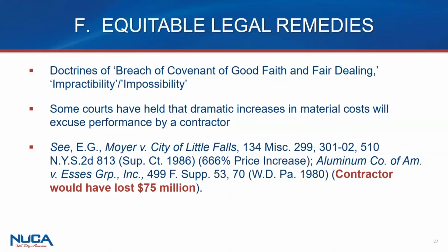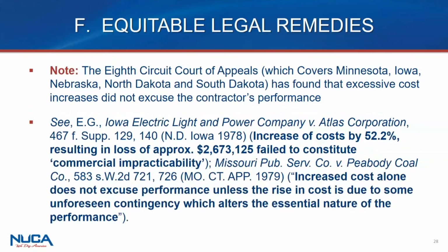But again, so many public owners, certainly more likely with city and county owners, are not going to be as educated. That really emphasizes the need for you as contractors and suppliers to educate them on the scope of the problem and fair ways to address it. All right, we've got 5 minutes, Tom. We're going to keep it under an hour here for these people. One last thing is recognize that there are equitable remedies established by some courts that say if the price increases are so great, you might have a right to have your performance excused. We cited some courts that have recognized that right; others have not.